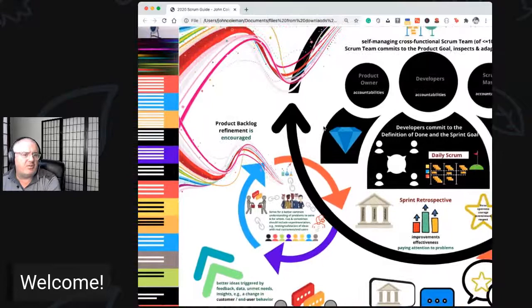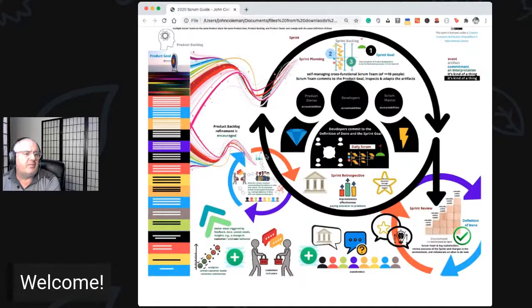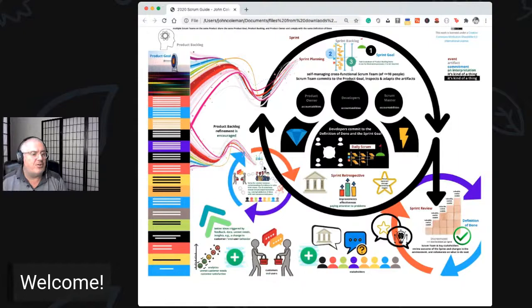In Nexus and LeSS, product backlog refinement is essentially a mandatory event. When you get multiple teams working together, you really need to make sure you align everything and have a clear understanding of what you're trying to achieve.